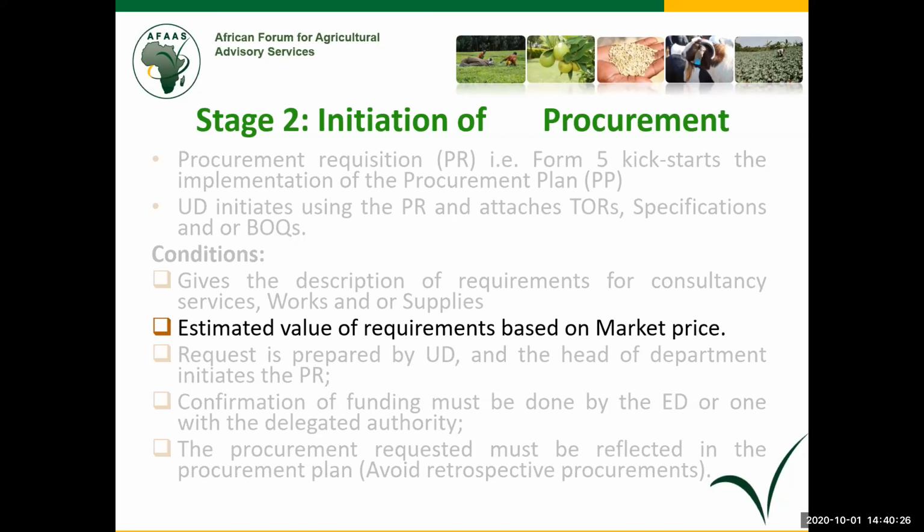You will have again to go into another internal processes, approvals, until the money is increased to cover the contract or the purchase order. That's when the system will accept. Because we are operating manually, we take these things lightly, but it can delay the process and frustrate you as a user. So undertaking market research is very important.